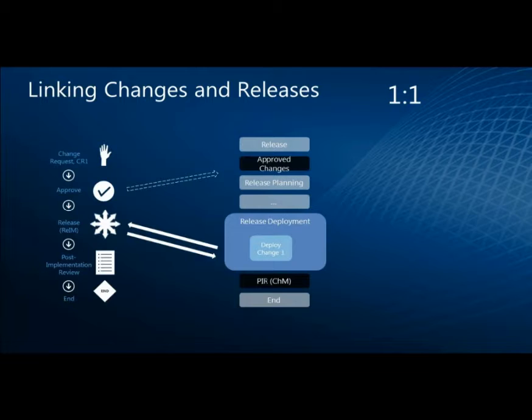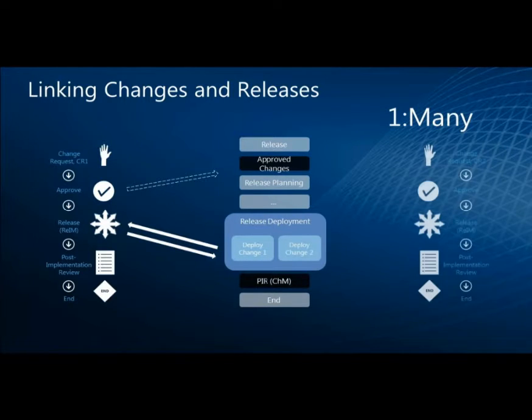So you have both the change request being completed as well as the release record referencing that particular change. Think of it as our release record controls all the changes that take place, but we can then stage what change takes place when in the cycle of the particular release record. Because we can do this in either a parallel or sequential manner, when we get more than one change taking place, we can link out to each of those individual change request activities and bring them together inside of a single release and ensure that we're coordinating and managing the rollout of those changes, and that they're happening in the proper order and that they're not going to collide with each other.